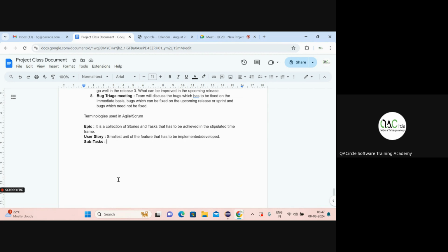And once the table is created, for the columns that the table should have, they will create one subtask. Once they create it, the developers will do unit testing. To do that unit testing, they will create one subtask, or they'll come up with the unit test cases. And once they come up with the unit test cases, they'll create one subtask stating execution of unit test cases.